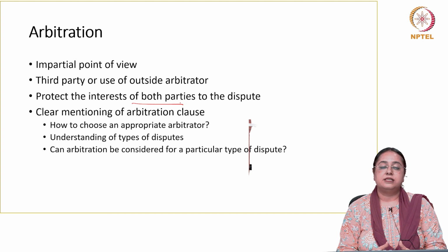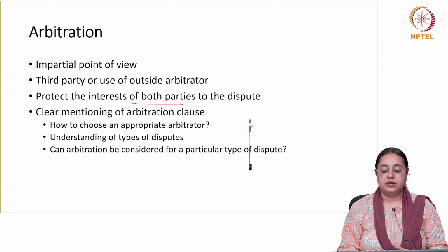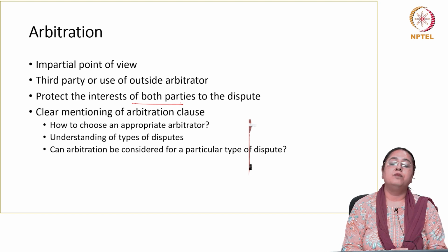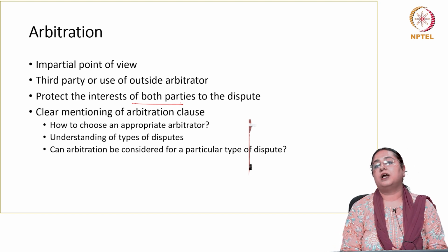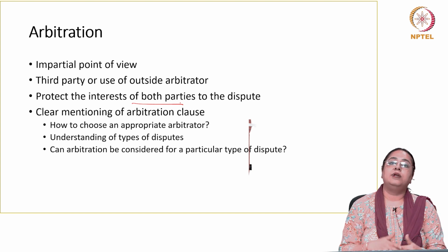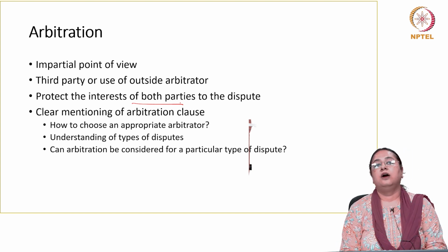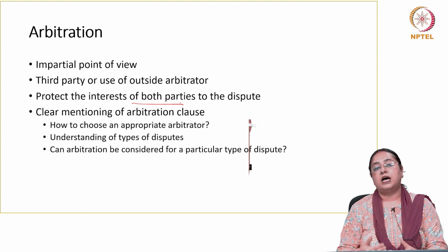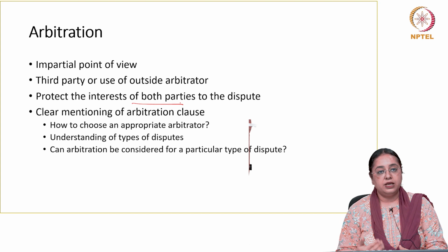But when a conflicting situation happens, what law would govern the resolution of this issue, which court would address it, what kind of arbitrators will be helpful in an international setting, and what should be the language used? All those aspects become very important.